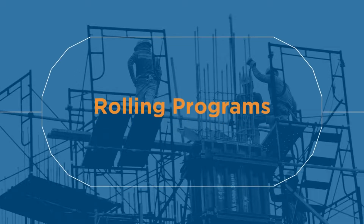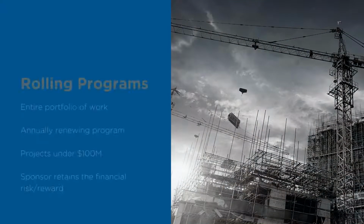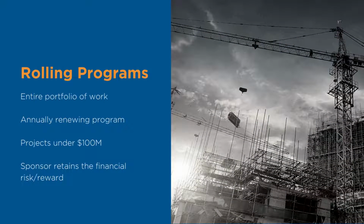Now let's get into rolling programs. Under a rolling program, the project will be enrolled into a pre-existing insurance program with a set carrier and established terms, conditions, and pricing. The coverage provided, remember that's workers' comp, general liability, and excess, the limits available for purchase, and the work necessary to place and administer the CIP, as well as the financial risk reward, are identical to those of a single project placement.